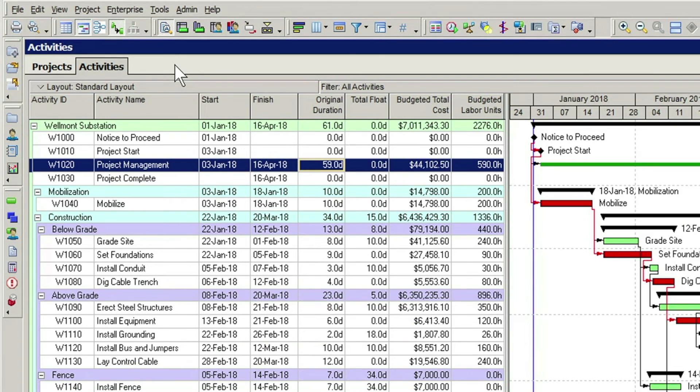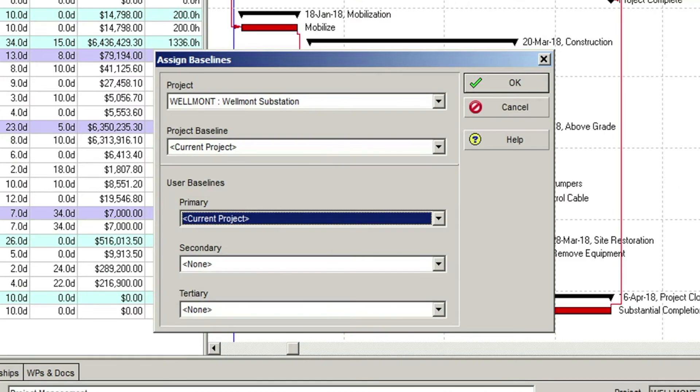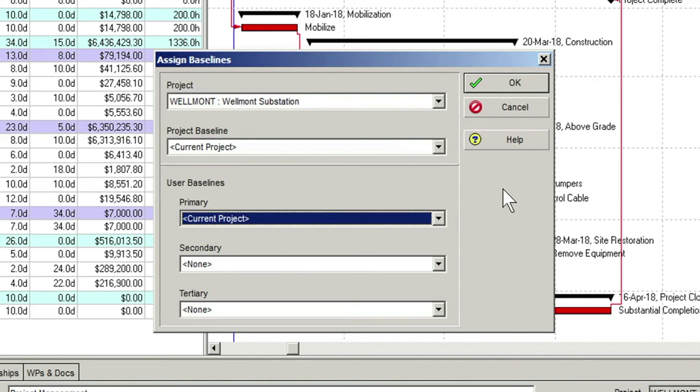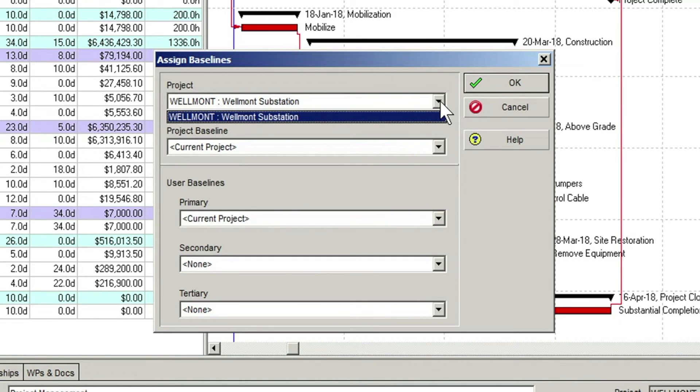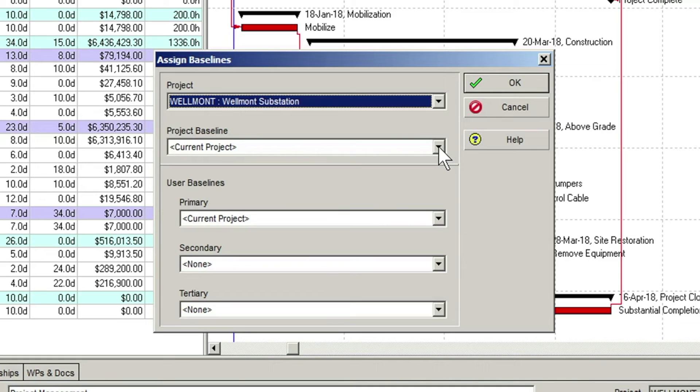Again, we return to the project menu and this time we choose the Assign Baselines option. In the Assign Baselines dialog, we can see the currently open project in the top field. Below that field is the Project Baseline field, which is set to Current Project at this point. Basically, it's using the current project to display values in the baseline fields.